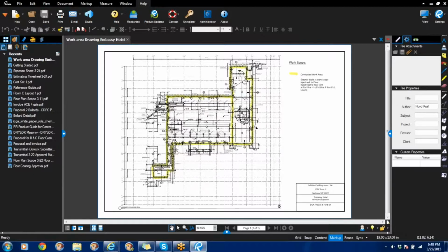When I do a time and material project where there's no way of telling how long it's going to take or what it's going to take, I use the Pro use for the login, and I send that as a PDF to them every day. It's also posted, and that way they know that this is what happened. They know the materials, everything is right there for them. And it stops the phone calls where they say, I never got the information, because I know it's all right on the site for you. And they've always got it.